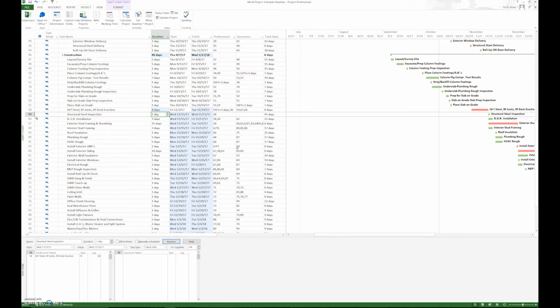So the first one is changing relationships. The second one is changing the manpower assigned to an activity. And remember, we only want to change activities that are on the critical path, the activities that are red. The third and fourth ones, the means and methods, are a little more difficult. We won't get into that, but that changes the material and the method we use for doing it. It's like using tilt-ups rather than prefabricated panels, or using masonry walls. Those are means and methods. So that's our goal here, to compress the schedule.